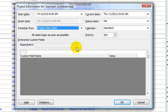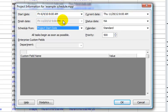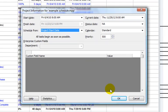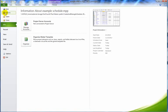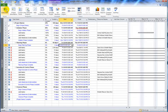Typically in a new project schedule, if you've set the start date, tasks that do not have a predecessor will automatically get that start date when you add them into your project. When you have the settings the way you want, click OK. Then go to File and Save to save these settings.